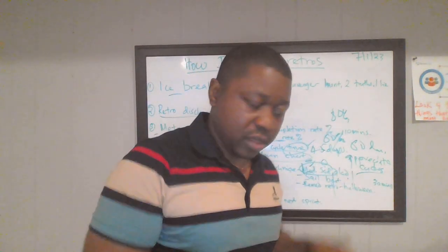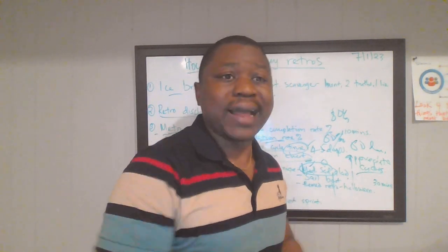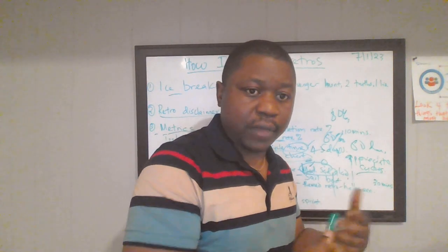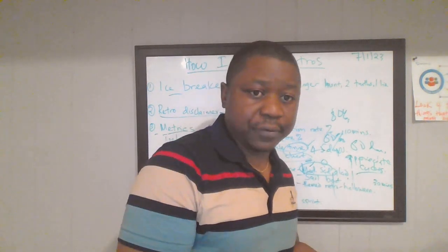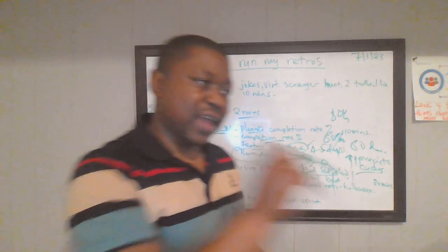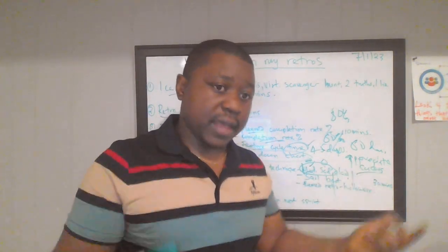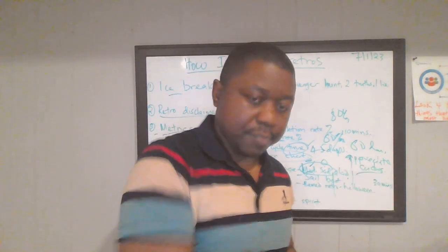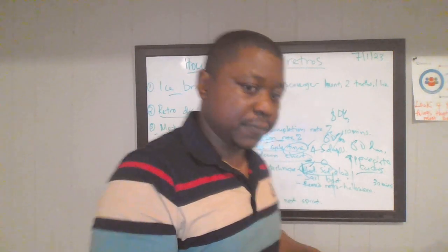So one retro action item was to get one of the engineers within the team trained on how to review and merge some very simple PRs. So we took that action item, created an issue for it, and assigned it to the engineer that volunteered to get trained on how to review and merge PRs for the rest of the team members.